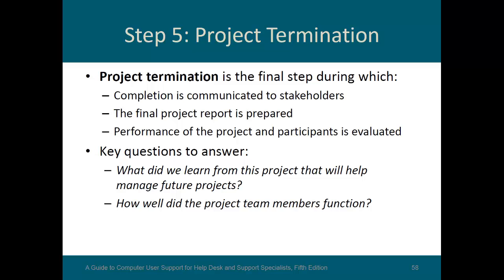So key questions to answer: what did we learn from this project that will help manage future projects? You got to document that. And how well did everyone do? So that way when you do the next project, you can see, were there conflicts between one or more people? Did someone stand out positively or negatively? And then, of course, give bonuses or raises to those that did well.